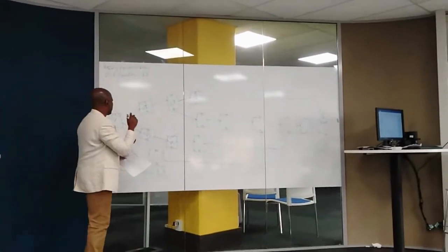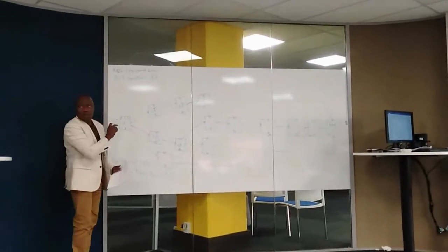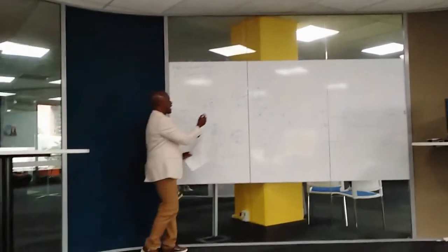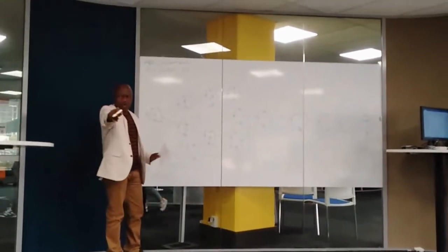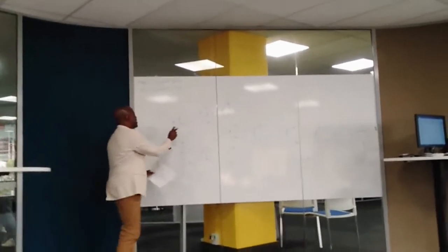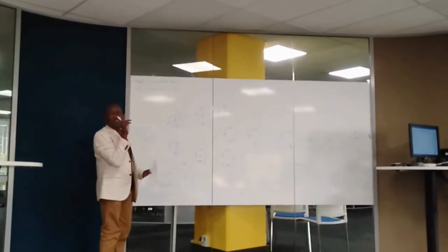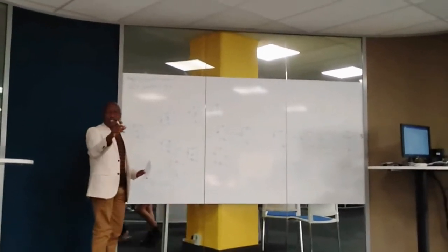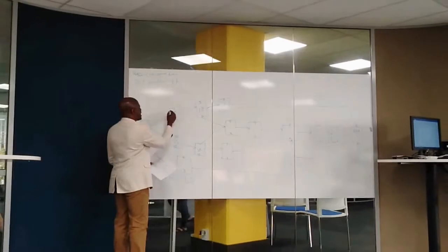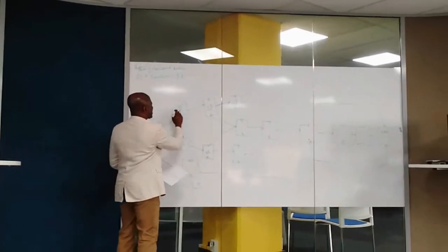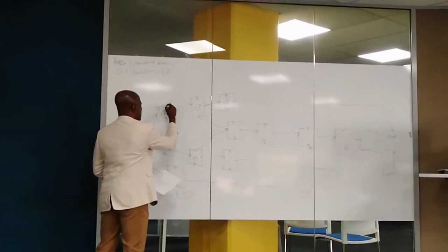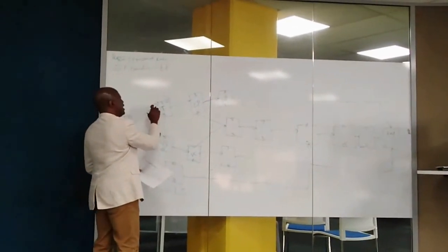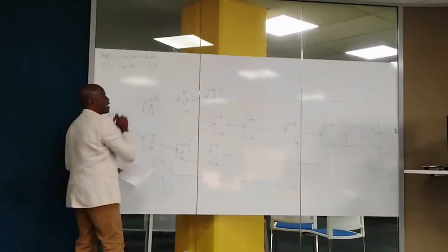Now we are moving forward. We said this activity must be completed before we do this activity. And this activity has 3 days to work on its own. So for this activity to complete its work, it has to be the 3 days here, we transfer it here. Am I making sense? Yes. So these activities will be completed when? 6. Because it has 3 days for its own activity. It has 3 days to complete before it will go, so make it 6.